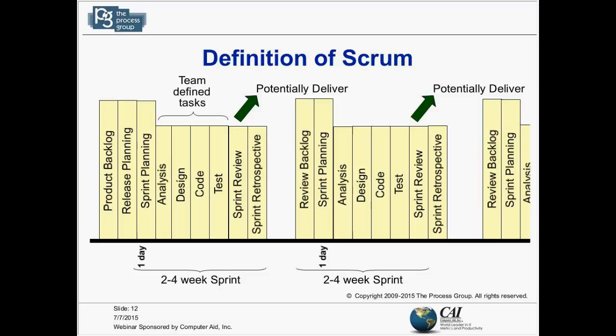And then if you pick a sprint, which is an iteration or a 2-week increment, it could be 2, 3, or 4 weeks, say 2 for simplicity, then we do sprint planning. We define the activities for that particular 2-week period. And then we go through a sprint review or demonstration at the end of the 2 weeks, which is a way to objectively see that the part that has been finished correctly actually functions, and then a retrospective or lessons learned to figure out how well we worked and where the challenges were, to fold those